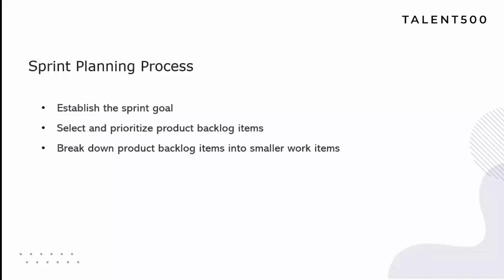And as you finish the work item, you can pull an item from your product backlog into your sprint, which is aligning to the goal. Now, in order to reduce the waste that comes with bottlenecks or dependencies or impediments, planning can also identify any dependencies among Scrum team members and how to address them.